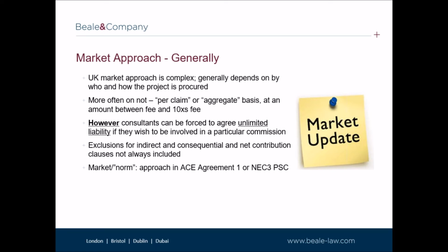Where consultants are required to submit a proposal for a particular project, in the absence of terms and conditions proposed by the client, the consultant's proposal will usually incorporate its standard terms, or an industry standard form of appointment such as the ACE agreement or NEC3 PSC, which we discussed earlier. Consultant standard terms and conditions will contain limitation and exclusion clauses.